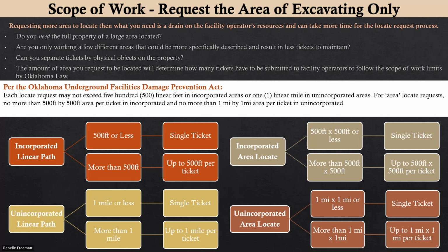Let's talk a little bit about scope of work. Again, request the area of excavation only. Requesting more area to locate than what you need is a drain on the facility operator's resources and can take more time. Plus, if you provide that you need to locate the entire property of this really large property, but